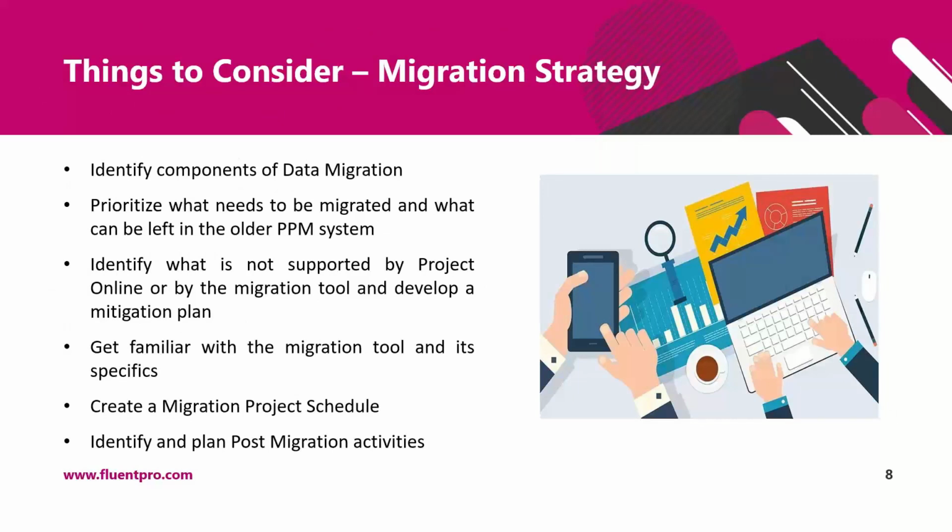We suggest that the migration strategy development should include the following steps. The first one is to identify components of data migration, prioritize what needs to be migrated and what can be left in the older PPM system. Migration is a good opportunity for a cleanup of all those obsolete custom fields, PDPs, reports, and so on, and also for archiving of the closed projects.